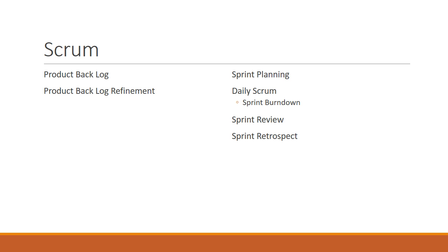If other members of the group that he represents want to add features or add things to the project, they are not able to do that until the end of the sprint. You typically can't interrupt a sprint, so changes would typically occur after a sprint is complete.